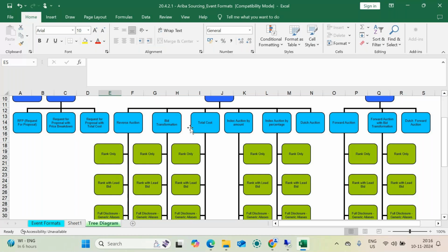The supplier is going to check the pricing and everything, and then he will decide, okay, I can deliver this material at this price, I'll accept that price. Once he has accepted that price, the auction will be frozen. No ranking, no disclosing of your name and everything. There is only one chance to accept that price. So that is called Dutch auction.